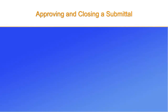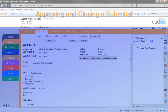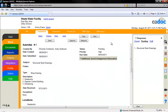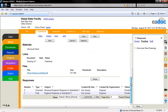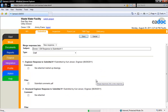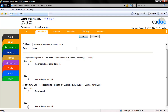This section deals with approving and closing a submittal. The first step in approving a submittal is to have a final response ready. You can always create a new response by clicking the respond button. But to combine multiple existing responses, click the merge button. This will take you to a screen where you can select which responses you want to incorporate. Once you click the save button, a new response will be created which contains all of the selected information.